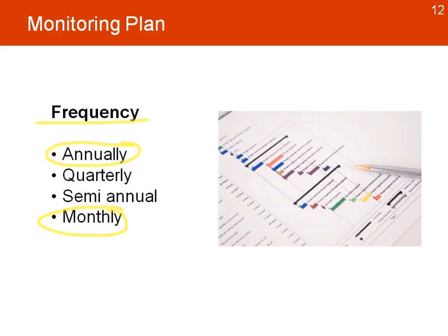You don't need to collect a lot of information if you know that the indicator is not going to make any changes. So the indicator is going to be a good source of information to let you know how often you want to collect it. And that way your indicator will tell you if it's a monthly, quarterly, or semi-annually effort.